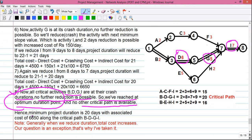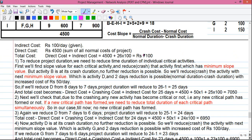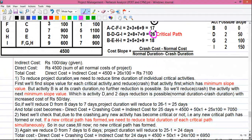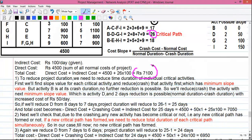The minimum project duration is 20 days with an associated cost of 6650 rupees along critical path B, D, G, I. Comparing with the initial situation, we have reduced the project duration from 26 days to 20 days, and project cost from 7100 rupees to 6650 rupees.